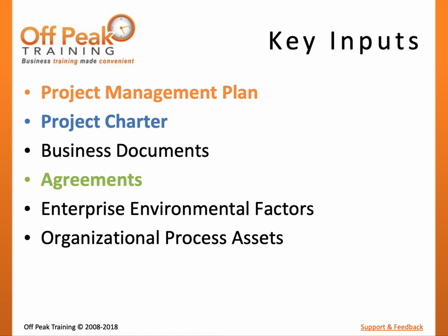Agreements may be used to determine stakeholders that are revealed in contracts that may exist between the performing organization and the customer. Also, as the performing organization forms relationships with vendors, suppliers, or subcontractors, they will become stakeholders in the project. Environmental factors can be an input, as organizational culture can influence which tiers of management will become stakeholders. Governmental regulations may also create new stakeholders. Finally, organizational process assets may contribute actual stakeholder registers from past projects, lessons learned, and templates.